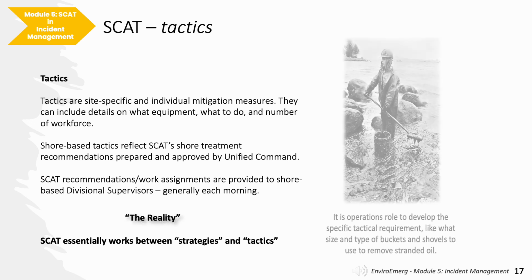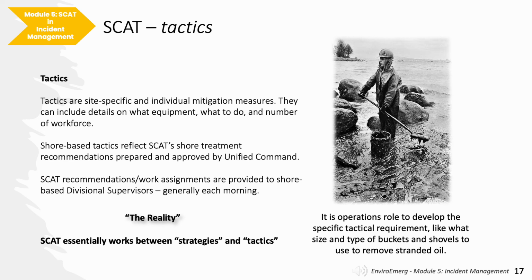Tactics get into the detail on how operations will achieve a specific strategy, such as is defined in their assignment or work orders. Their assignments would be the shoreline treatment recommendation forms developed by SCAT. Though an STR form may call for manual removal of oil, it is operations that gets into the details of what size of shovel or bucket to use. Reality is now setting in. It becomes a question of whether there's enough buckets and people to actually do the job. Can you even get a workforce to the site to undertake the shoreline cleanup operations? SCAT members need to keep that reality in mind at all times.